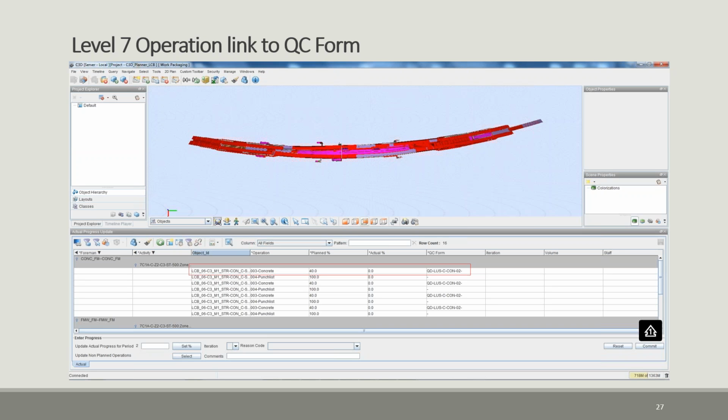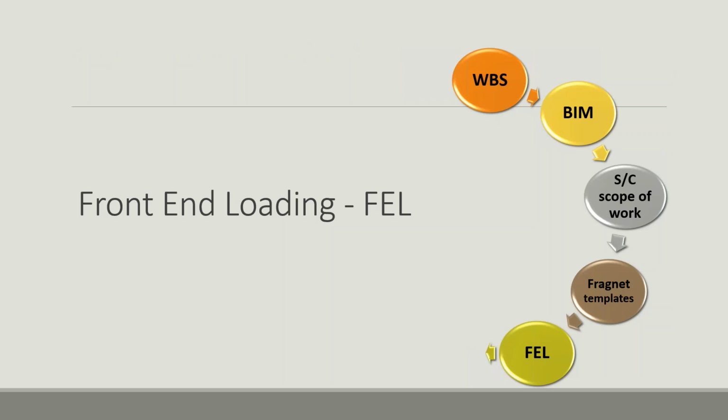So basically, if he did not leave it in proper shape, we forgot some sand, we issue a punch list item, we call it type 1. Type 1 means he did not complete the work. So we are ready to start, but before we start, we have to make sure that the material and the crews are available, so we have what we call the front-end loading.